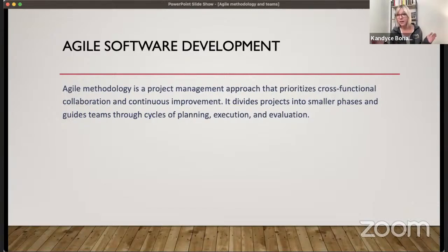Instead of taking 6 months or 6 years to deliver something, let's get something out to our users within about 6 weeks, push that out really quickly, and get feedback from our users and piece that back into our requirements so that we continue to improve our software much more quickly. It speeds up the whole cycle of software development. Instead of one big circle, now we have a whole bunch of little circles all together.